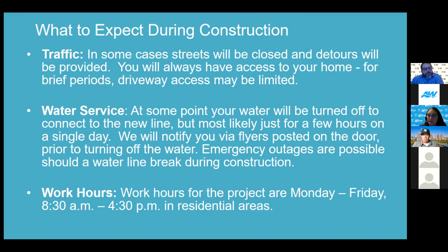Hi, this is Ruben. As I mentioned earlier, the proposed paving associated with this project is such that we will mill the residential roadways, which is essentially removing the top layer of asphalt and then coming through with a fresh layer of asphalt.